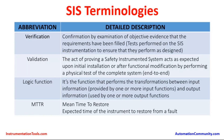Validation is the act of proving a Safety Instrumented System acts as expected upon initial installation or after functional modification by performing a physical test of the complete system end to end. Validation means testing a particular operation sequence of the Safety Instrumented Function — initiating the sensor to reach its maximum limit, sensing level high, pressure high, or temperature high, then the logic is performed automatically and the respective final element takes action to close. This complete testing is known as validation and is performed only once when the system is implemented or the SIS is modified.